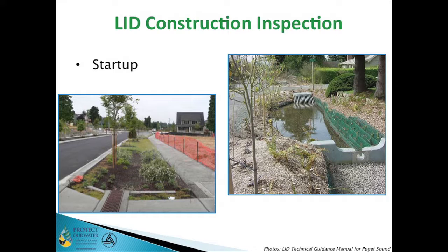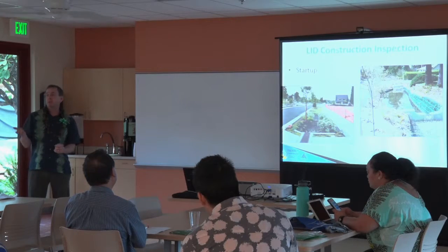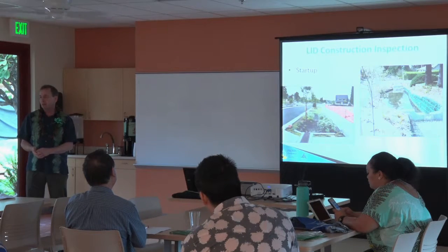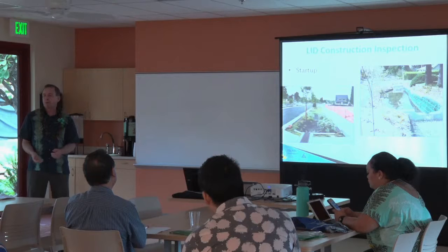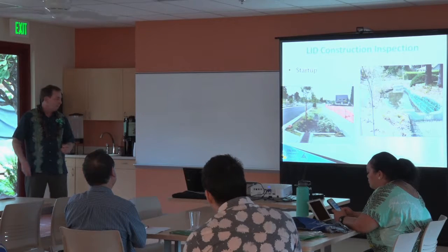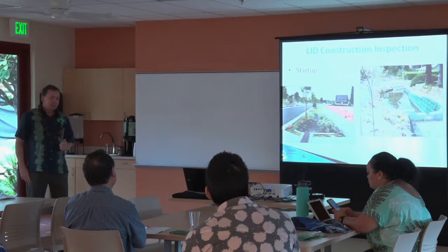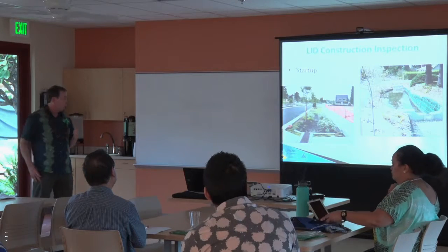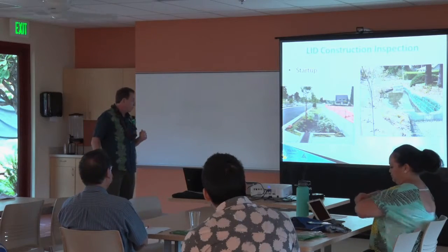And we often include in the contract that the contractor has to maintain some of these things for a year. Not always, but often. And that inspection and maintenance might be on a different frequency than what the project normally requires. So it can be sort of a different beast, and I'll talk a little bit more about that in a minute, but it's something to be aware of.